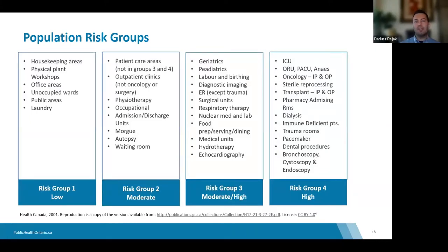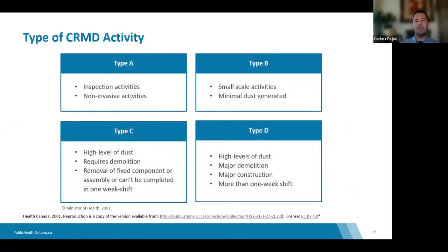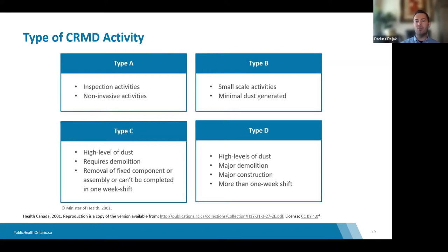The second factor is the type of CRMD activity. If you're simply painting a room with a paint brush or roller, that's a Class A activity and wouldn't require many additional measures. However, often beforehand there's patching, sanding, and additional work. You have to look at the whole scope and inquire with those doing the work — only after that will you have a full picture of what's really going on and be able to make an accurate assessment.